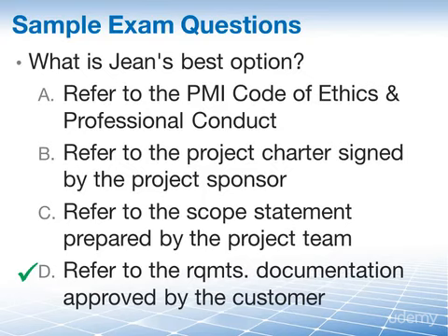The requirements documentation will tell you how the customer requirements relate to the business needs, what kind of quality requirements the stakeholders had, and a dozen more similar aspects in regards to the requirements for the project and product. They also contain the acceptance criteria, which you should refer to when the customer is validating the scope. And this concludes our look at the validate scope process.